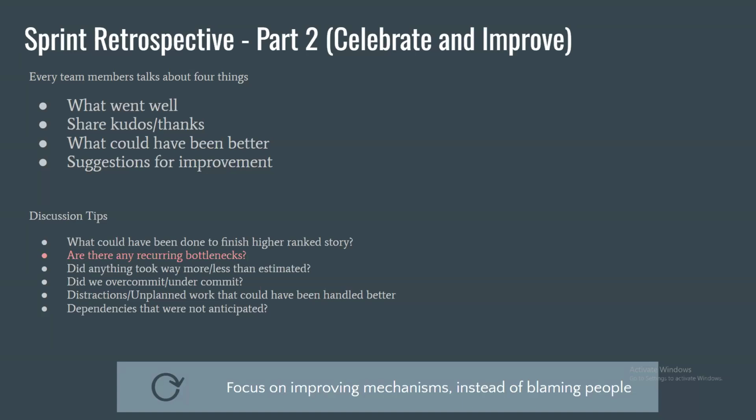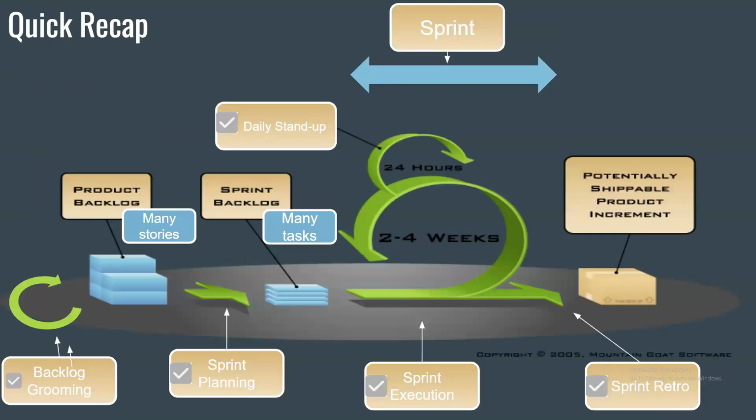So those three things go back to the backlog, and this whole process repeats. The process that we had started with, backlog grooming, and then sprint planning. And from that, we break that into tasks. We assign the tasks to the people. We do the capacity planning for the sprint. And that's how you get to your next sprint. And this cycle repeats, right?